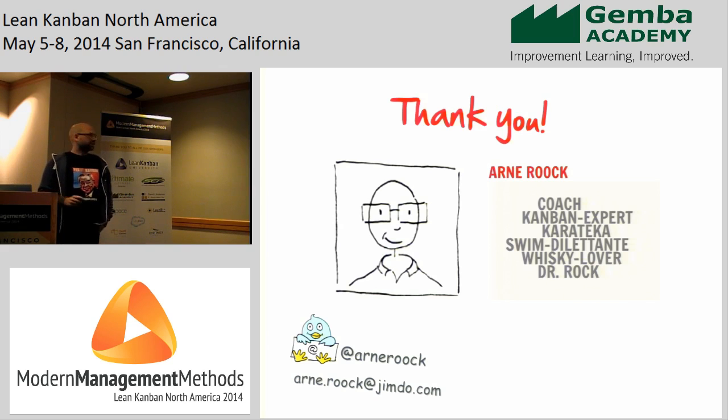There were some more questions. Yes, please. How do you go about making a consensus-driven decision, and how frequent are your... You mean the open prioritization meeting? It's bi-weekly in this team. And the question was about consensus in this meeting. It's not a democratic vote, so the founder has the last call. He asks for different opinions, and he involves different stakeholders, but then he says, we're doing it this way.